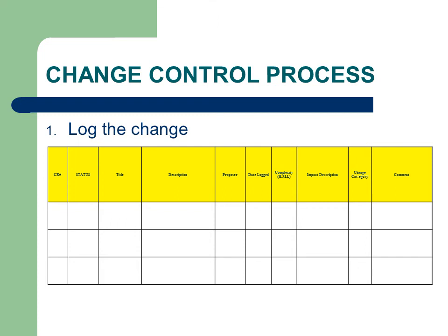Upon receipt, the request for change must be logged in a register with a change request number, the date it was received, details of who raised the change request, and what the change request is and why it is required. The change control register must be kept updated with the current status of the change as it goes through the assessment and approval cycle.